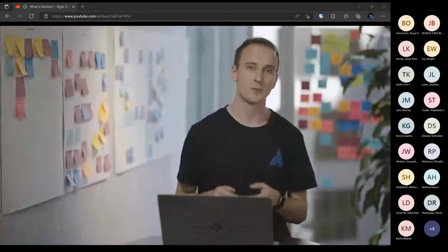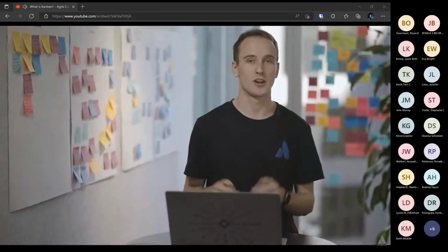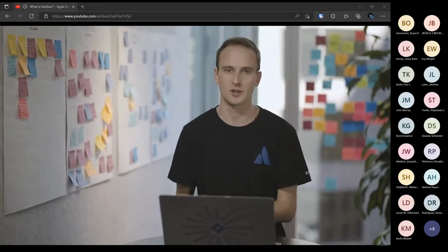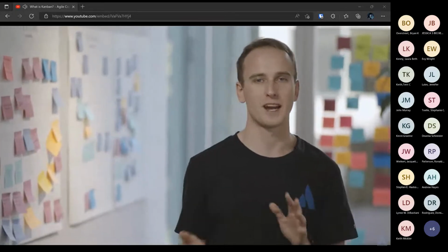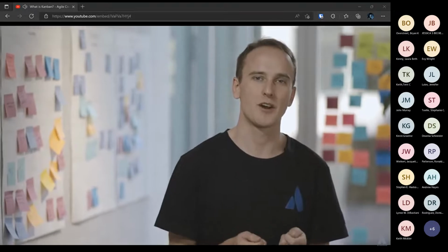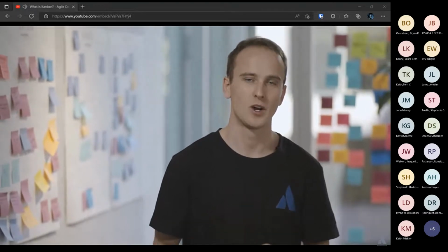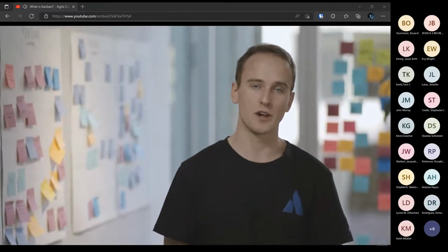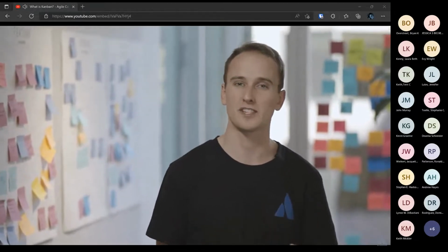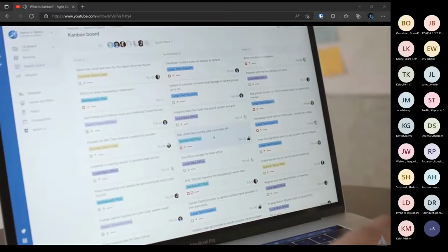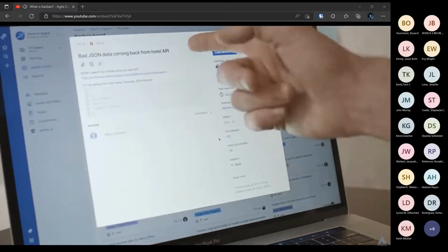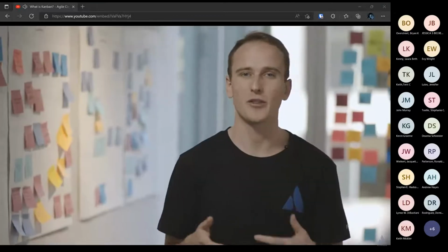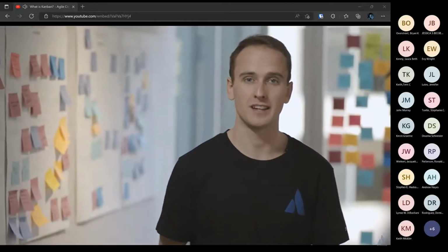For the agile software developers among us, cards should be a familiar concept. You can think of them as one Kanban card per user story. For the rest of us, we can just back up. You can think of Kanban cards as being work items. One card per work item. You want to make cards for all the things you're working on and place them in the appropriate stage of the workflow. Kanban cards should have a title and a description and an owner. You can also add any other helpful information like a due date.